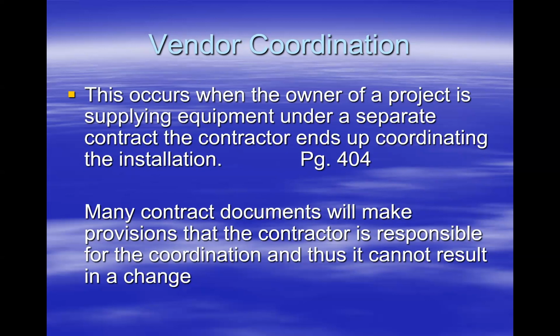Vendor coordination. This occurs when the owner of a project is supplying equipment under a separate contract, and the contractor ends up coordinating the installation. Where this has actually happened to me is oftentimes when I've had owner supplied material. In the contract, it specifically states that it's owner supplied, but the contractor has responsibility for coordinating the installation.